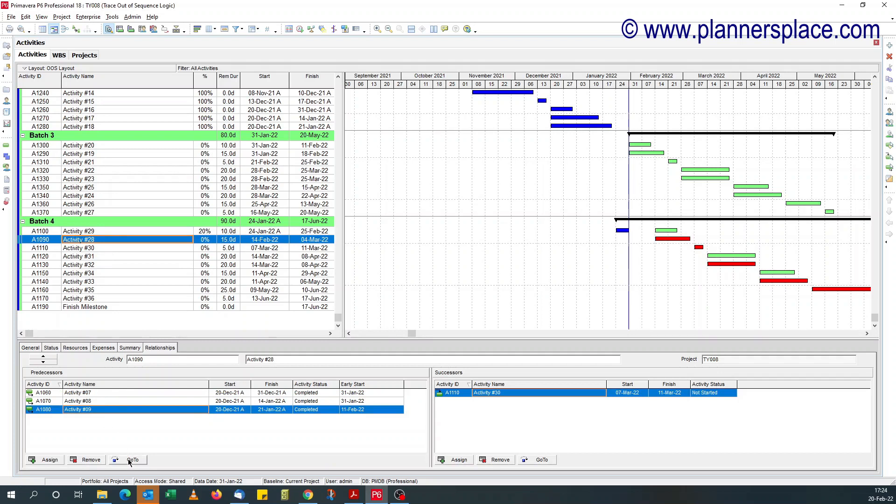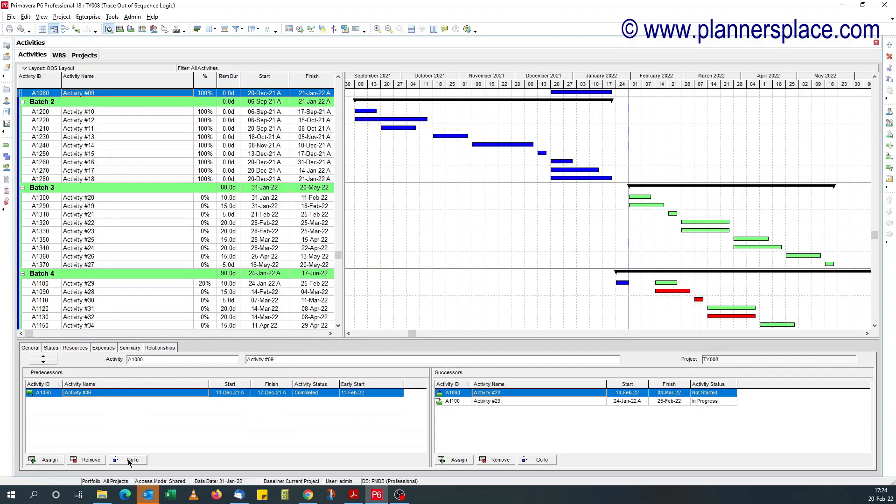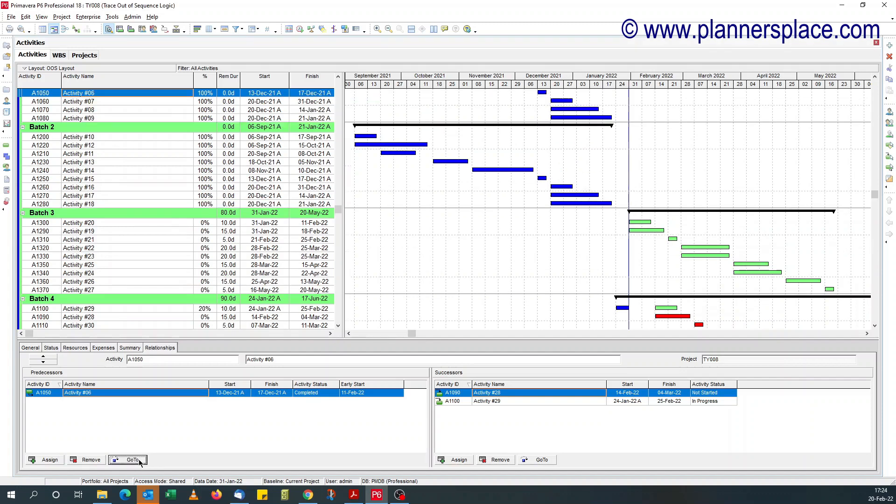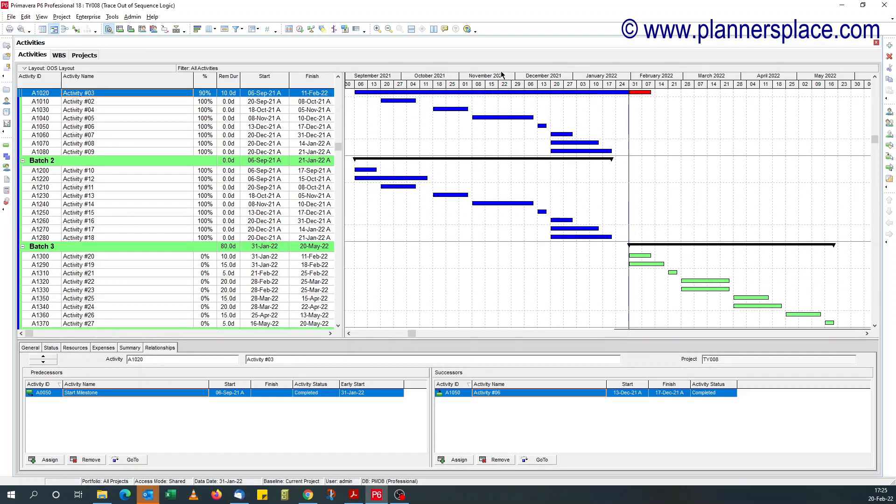So all I need to do is find activity six station 11th of February and it's not complete. So we're looking for an activity that's in progress here. Voila, it's shown us activity three, it's not complete, should have been completed, but it's not completed. And it's still retaining that logic. So if you go to activity three, you see this what's causing the break.